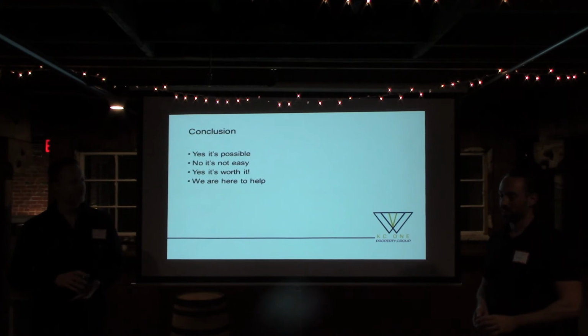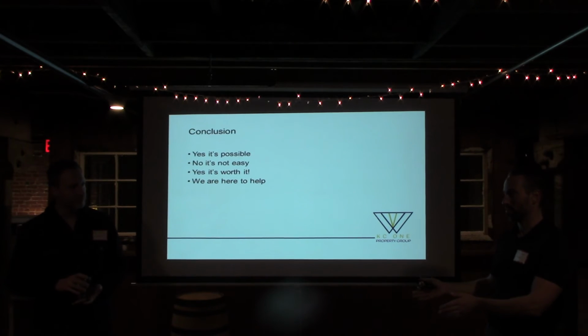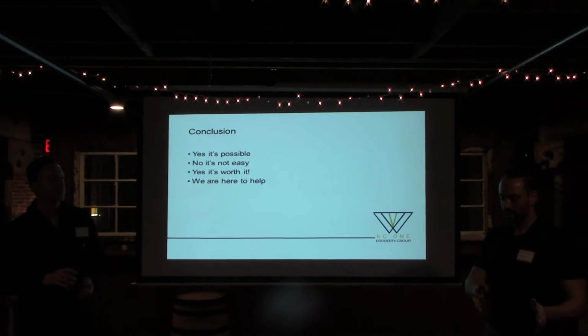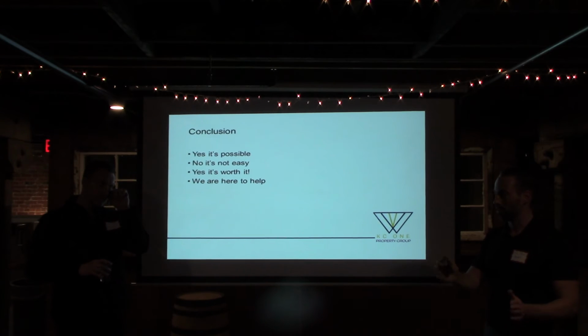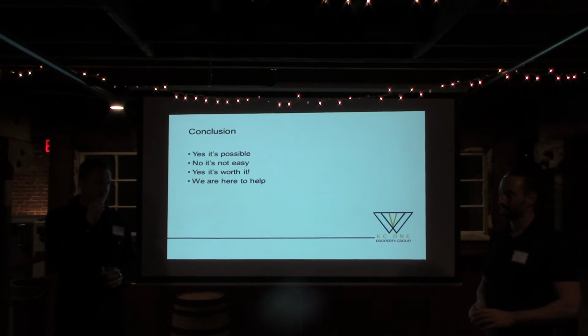So it's not that reserve or contingency money. That's real money that you're going to spend. So figure out what it needs to be. I'd say from our original bid the contractor gave us to what we actually end up spending is probably somewhere between $2,000 and $5,000 over usually.